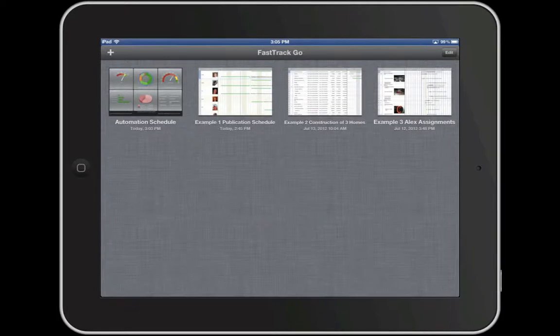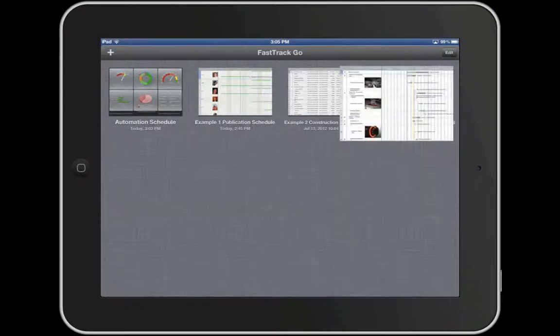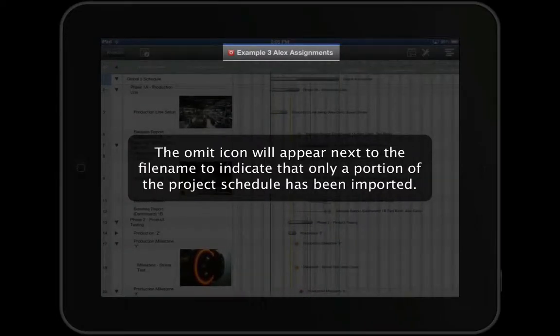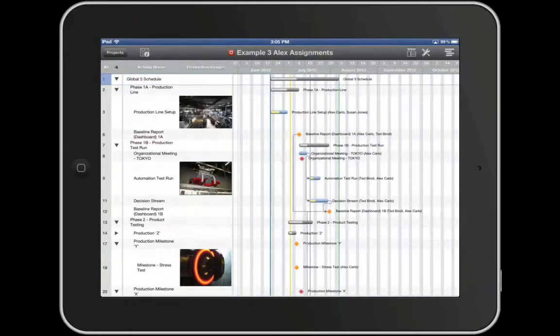Another unique feature of FastTrack Go is its ability to import FastTrack Schedule files in a filtered state. Here we're in FastTrack Schedule 10 with Alex's Assignments filter applied. When I save this schedule, only the tasks that are displayed will be imported into FastTrack Go. This is a great option when you only need to share a portion of the schedule with certain people.